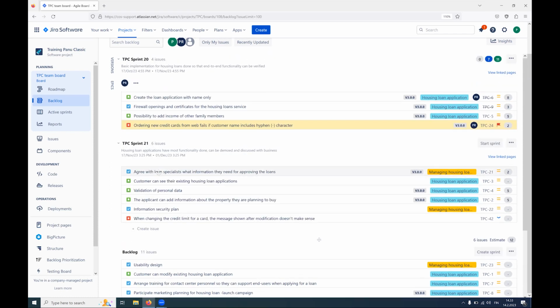Yeah, and same thing here when we have the backlog over here, that should be in priority order. So the product owner and the scrum master and the whole team is of course responsible that it should be in correct order. So when we are doing the planning, if we have more time during the sprint or otherwise, we can just take the next item from the backlog. So always in priority order would be our advice for you.